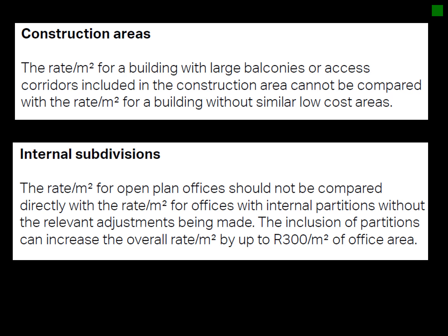The rate per square meter of a building with large balconies and access corridors included in the construction area cannot be compared with a rate for a building without similar installations. Similarly, an open-plan office development cannot be compared with a development containing many individual offices — you'll have more brickwork, more paintwork, more air conditioning units, and fewer centralized installations.